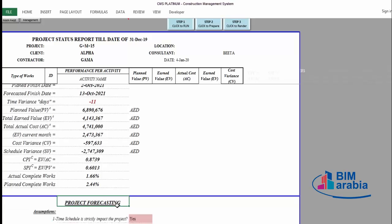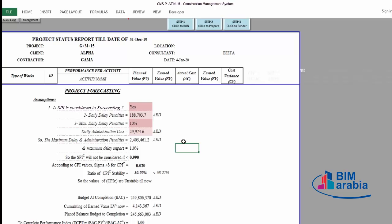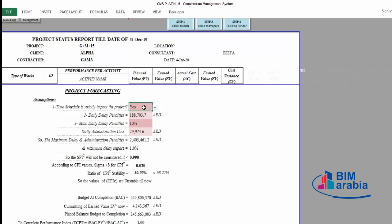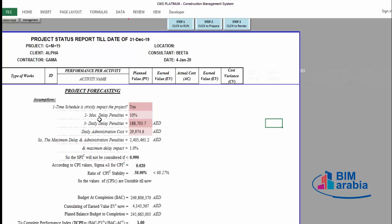Now let's see how CMS will make project forecasting. CMS proposes some assumptions. First, it asks whether the time schedule strictly impacts the project — of course it does, and this question is only to make CMS consider delay cost in its calculations. Second, CMS asks for the maximum delay penalty according to your contract — commonly 10% of the project price. You insert your agreed percentage. Third, it asks for the daily delay penalty: how much will be deducted from the contractor in case of delay every day.